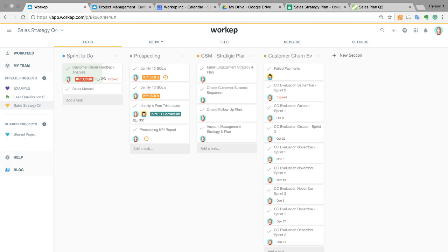You first have to identify the work that's being done based on the list of requirements that you have in your hands. You break down the work that needs to be done, you set up deliverables, you set up objectives, and then to achieve these objectives, you need to have tasks, different activities that need to be done so that you can achieve all these deliverables.